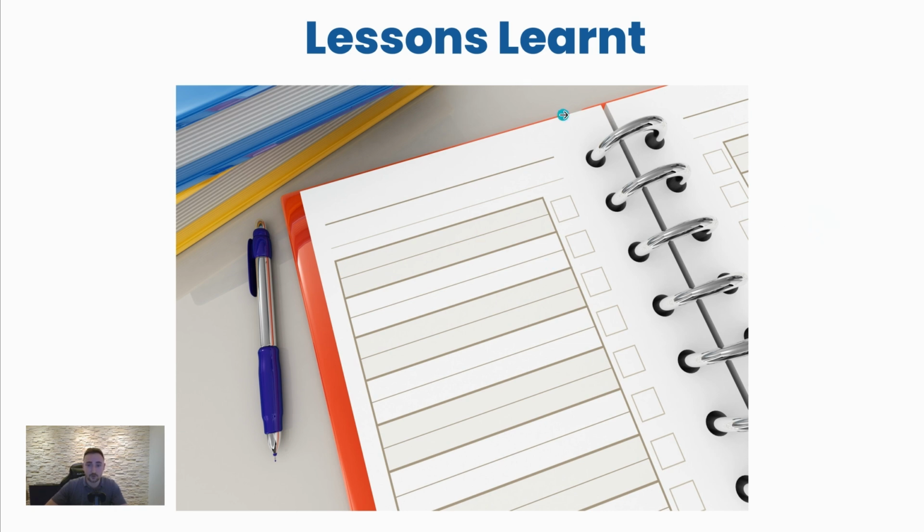Lessons learned. So I mentioned this before. Often we don't want to repeat the mistakes that we have in the past, or we can learn from the mistakes of other people or other organizations. Quite often helpful to log the things that don't go very well in an organization. This is standard practice in a lot of program and project management methodologies. So you'd essentially say what worked well, what didn't work well. So when it comes to doing something similar again, you can review those lessons and make sure that you avoid those mistakes again, potentially looking at some of the issues or risks that they were looking at, and they might be good prompts actually for you to then include them in your own risk register, or at least consider them and discuss them.